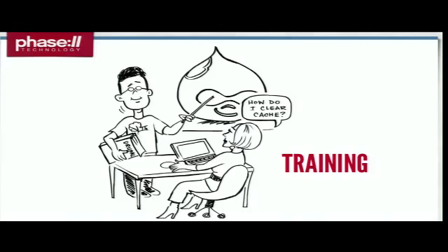Start early, do it often. Don't wait to the end and have this big training process. Because guess what? Rest assured, guaranteed, if you do it waterfall, and at the very end, before you go live, you do one big set of trainings, you will find so many bugs, so many problems in that process. You will be kicking yourself so hard. So it's better to mix them up.